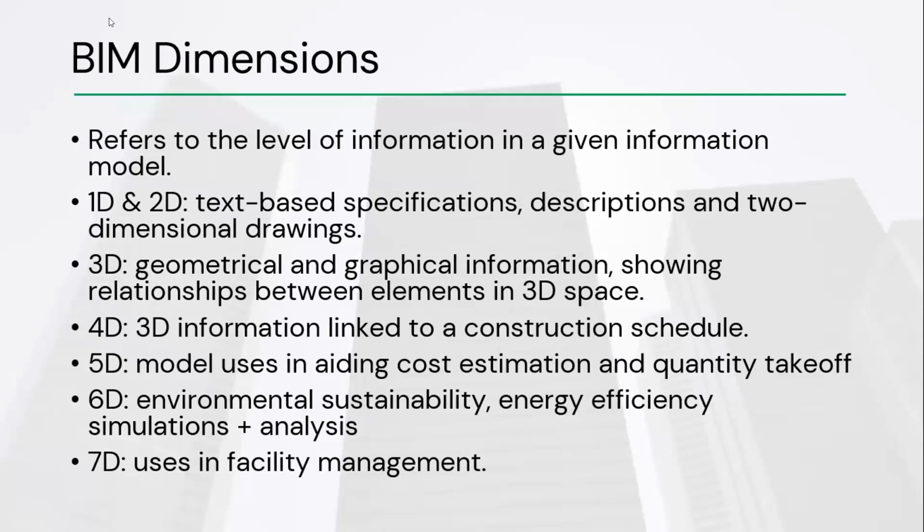You go to 5D, and this is where cost information is added to the model, or building quantities are extracted from the model and connected to estimating software so that we can develop cost estimates and bills of quantities even at the very earliest stages of the development of the project with more accurate data.